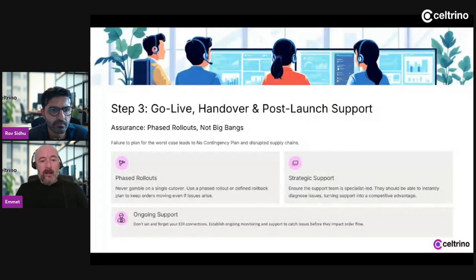So once the testing is complete, it's go live time. All you want is your system to run smoothly like it has before. Now, ordering systems will normally work fine. What you'll find is once you go live, you could get invoice errors as you're moving from one system to another. The data that's in your database may not be perfect. So you'll get a bunch of invoice rejections. So the support team will assist in cleaning up all the old data, and when invoices are rejected, we can help resolve any problems you have.